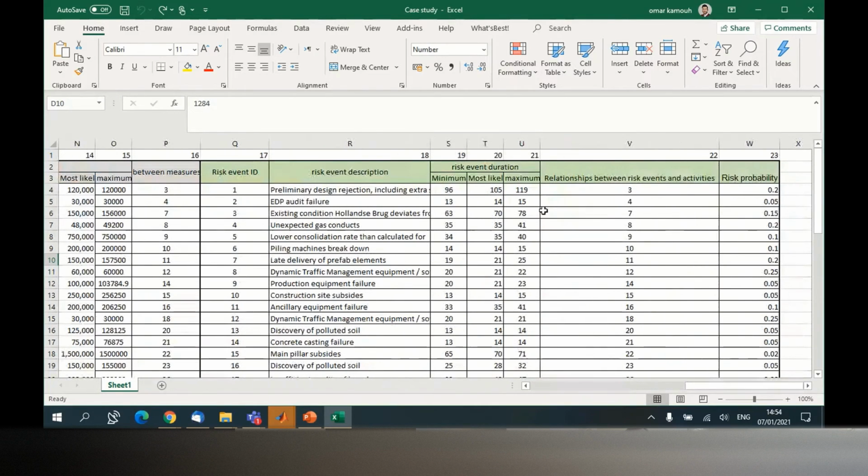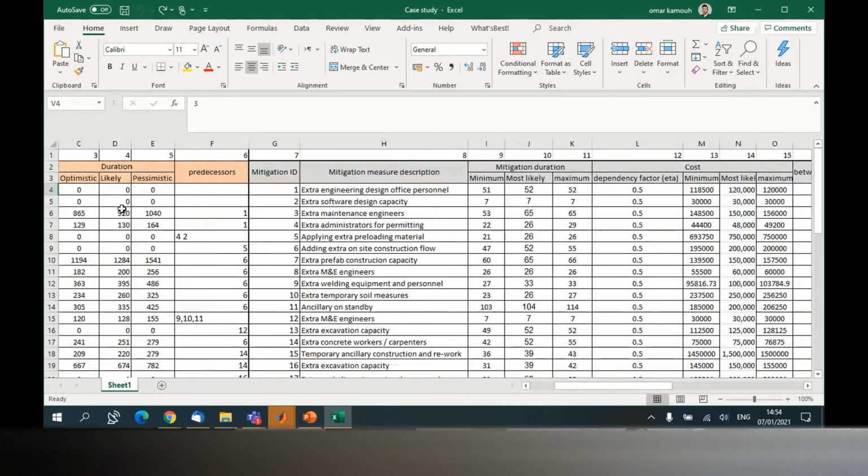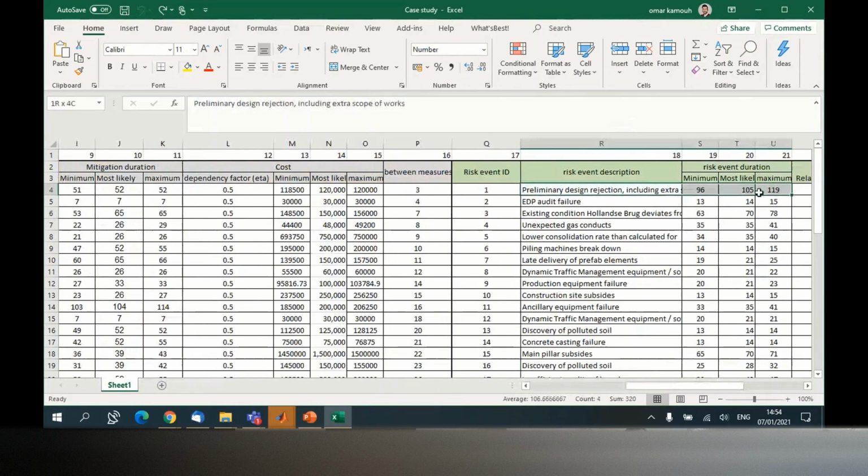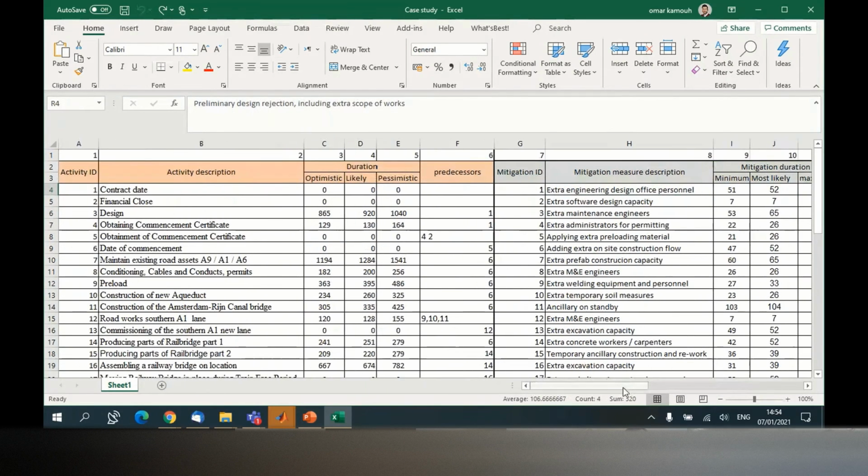Yeah, you mean if you have a risk that affects activity number 3, and you executed activity number 3, and this risk didn't happen, then you have to remove this risk and update the duration of the executed activity, or just remove it, because it's no longer part of your remaining project activities. So you just set it to 0, 0, 0, and you remove the corresponding risk. Okay, that's the updating.